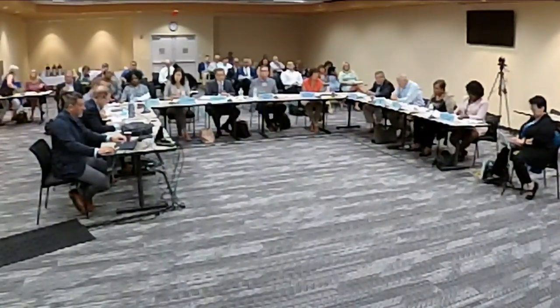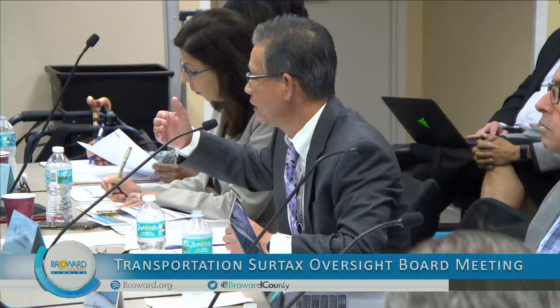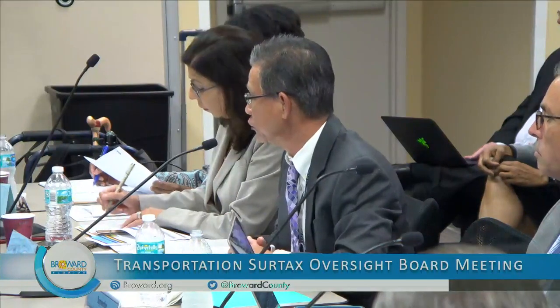I just had a quick question on line 1, dealing with the road capacity expansion and the dollars dedicated to designing that. It seems to be a little less than 10% of the total cost. Is that a benchmark that we can use going forward in terms of what we can expect in design costs? There are benchmarks, but let me explain that a little bit. It's typically for larger projects, as this one is, $24 million of construction. The percent of the construction is going to be around 10%, roughly around there. For smaller projects, you're still going to need to do the same workup and the engineering and that type of thing. So for smaller construction volume projects, the percent of design and so forth is going to be higher. And that's in general the way it is.